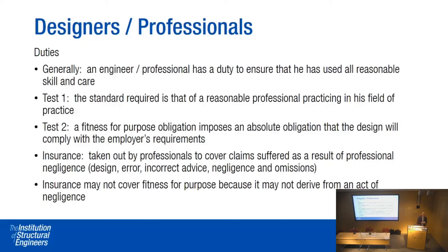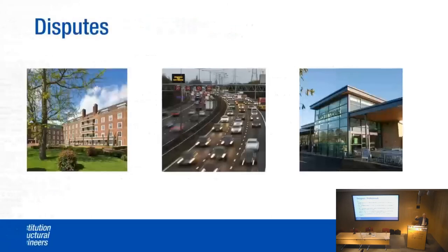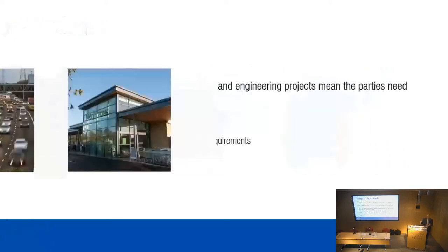A very important area for professionals and structural engineers is insurance. There is professional indemnity insurance that can be taken out to cover claims suffered as a result of negligence — such as design error, incorrect advice, negligence, and omissions. Importantly, if you have an absolute fitness for purpose obligation in your contract, your PI insurance may not cover you for it — it may be excluded from the policy.